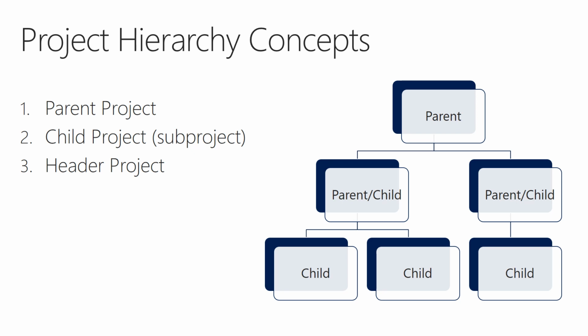What we could do is there's just an easy checkbox that you can flag at any level in a project structure that marks it as a header. So you check that checkbox, and then if you try and post transactions towards that header level project, you get an error saying, no, you can't do that. I think the specific error is "Project XYZ is defined as a header project. Registration should be done on a sub project." So those are some of the concepts that you'll see in Dynamics AX: parent, child, and header projects.